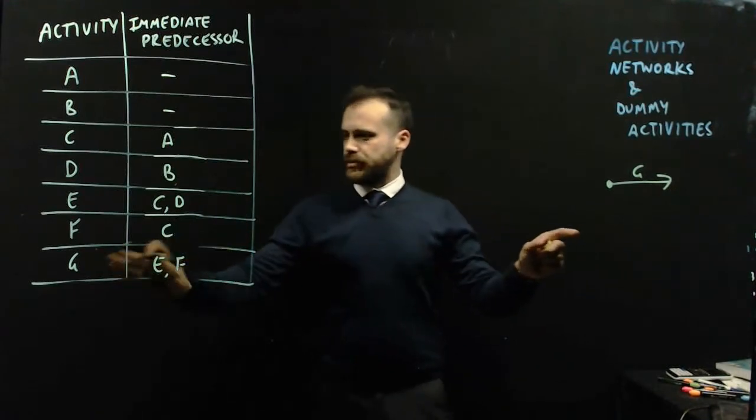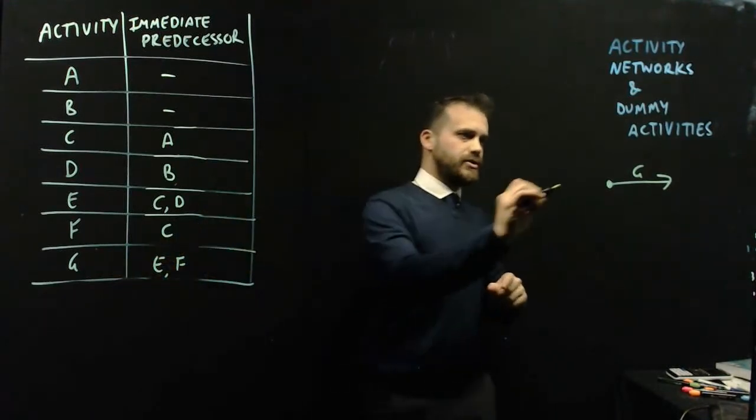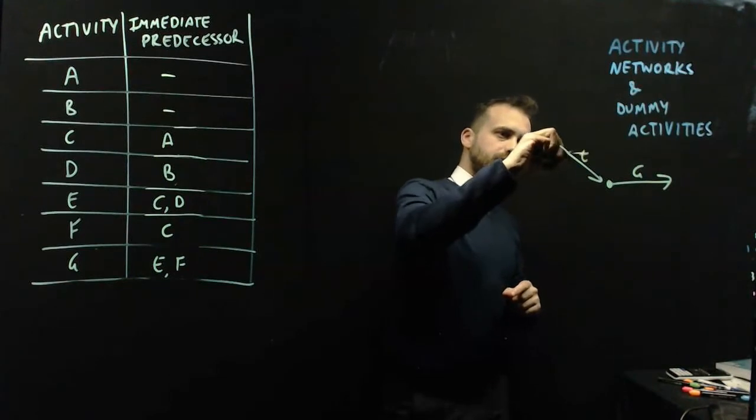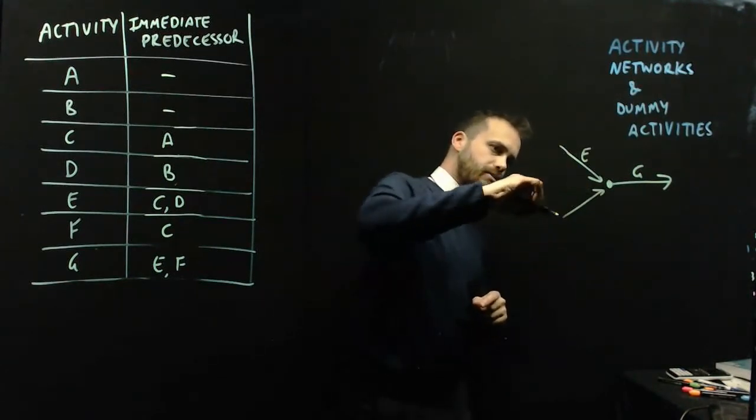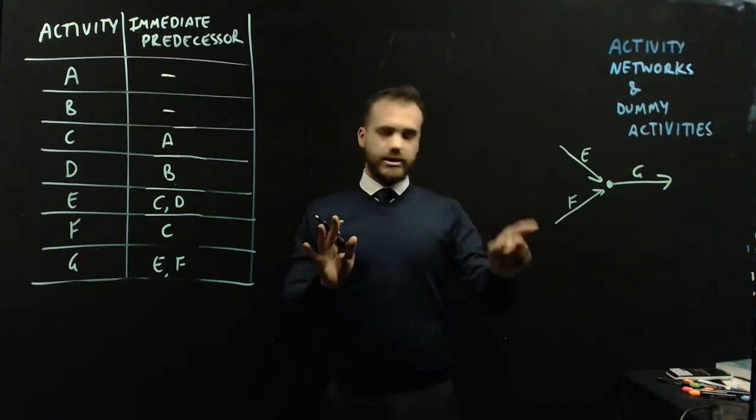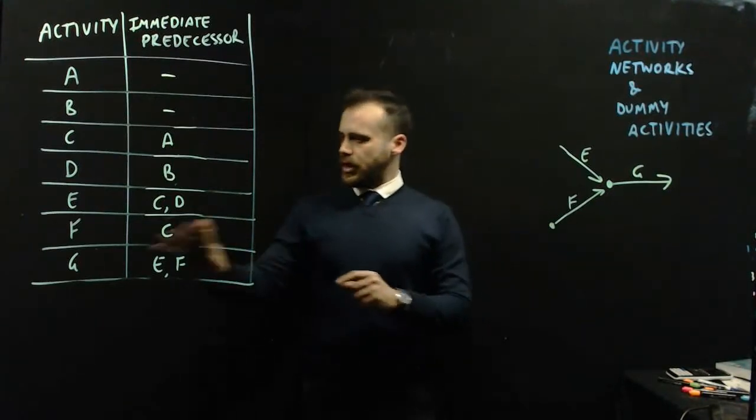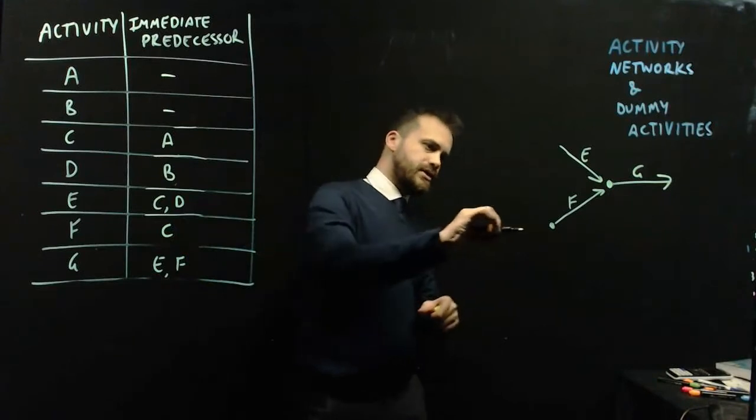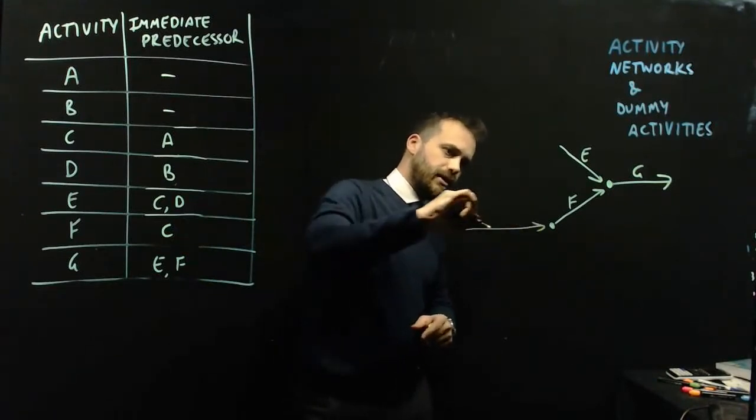The predecessor before G is E and F. So I'll set that one up there as E and set this one up here as F. Now let's deal with F. F has an immediate predecessor of C. So I'll do that one there like that.